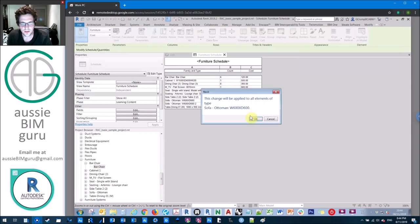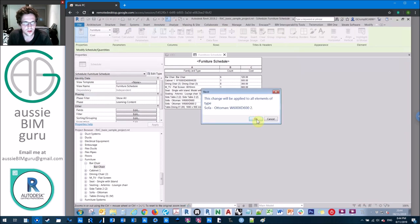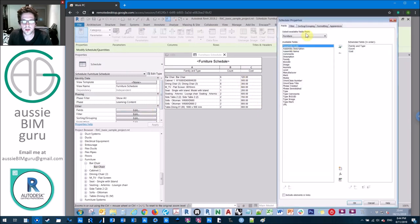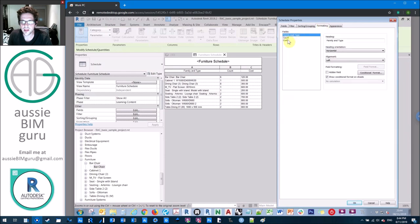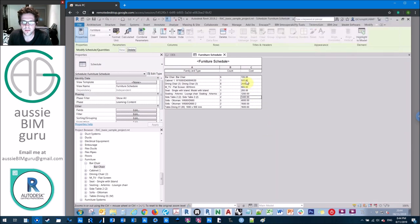I'm just giving everything a cost in the schedule — this is the unit cost, not the total cost for more than one element. If we want to make this reflect the total cost of each row, we need to go to formatting, select the cost field, and where it says 'no calculation' we go to 'calculate totals.' Now this is the total cost of the row — much more important.